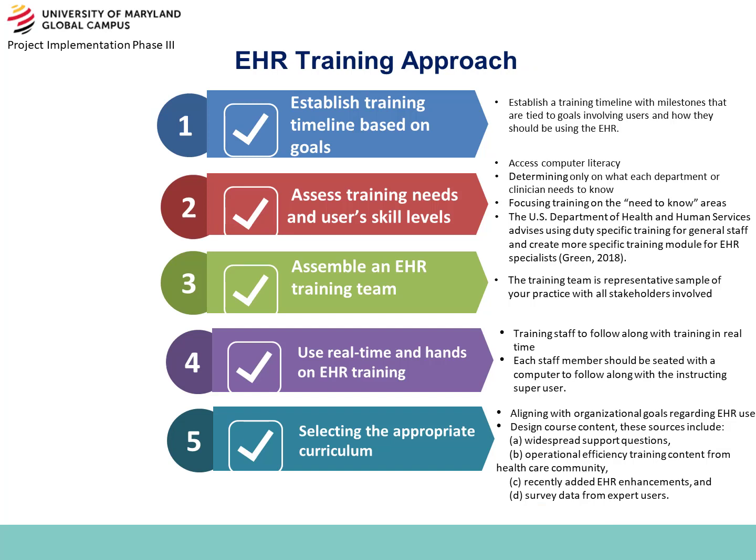We're going to look at the EHR training approach. Regardless of training category, this approach will be the same. The first thing we want to do is establish a training timeline based on the goals of the EHR implementation or the stage of where it is within the process. We want to have milestones tie into goals involving users and how they should be using the actual EHR.